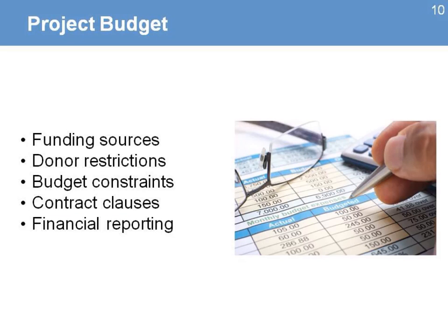On the area of the project budget, you can present information about the funding sources, donor restrictions on how the funding will be used, constraints about the budget, important clauses of the contract, and the process for financial reporting. You can even include people or representatives from the finance unit to help you in the presentation.